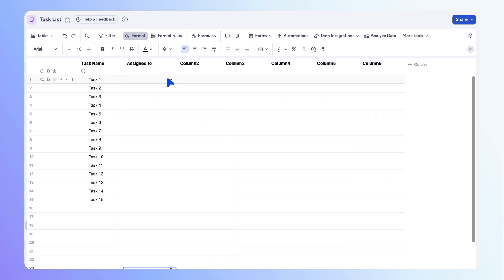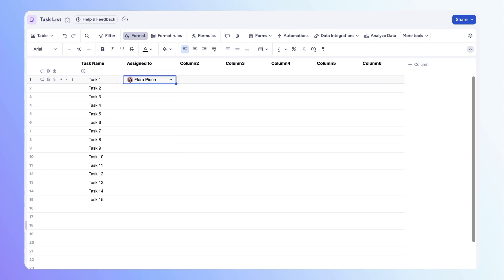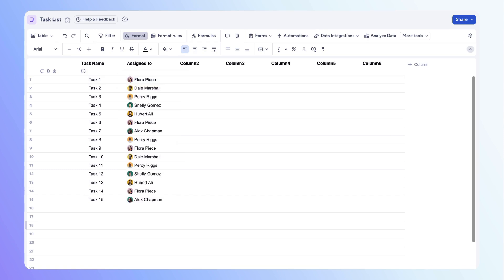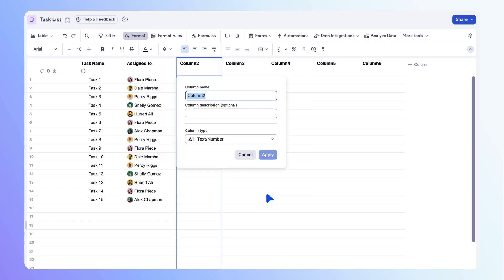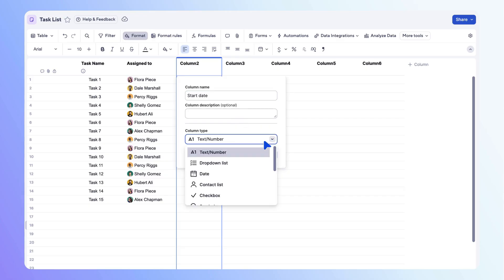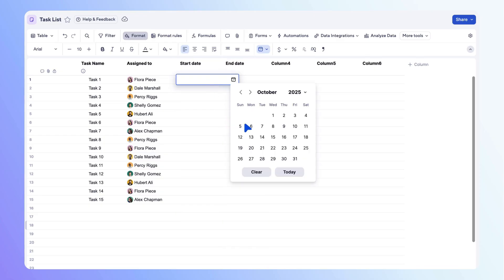Next, let's add start and end date columns. You need at least one date column to use timeline view. You can use the add column shortcut or use the column options menu to edit existing columns. Open the column options menu, select column properties, name the column start date, then use the column type drop down to change to a date type column. Select apply. Repeat those steps to add an end date column as well, then add start and end date values for each row.